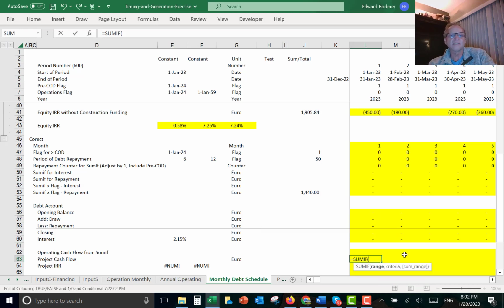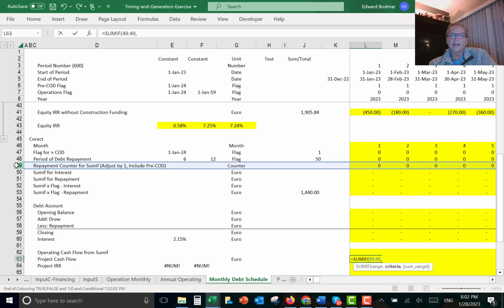This is where we go crazy. And this is where we take the counter, and I'm not talking through this very well. And this time we take that SUMIF, and we're going to accumulate the cash flow for the 6 months, but we can't pay it to our investors. So our real project IRR is affected by this timing a little bit.